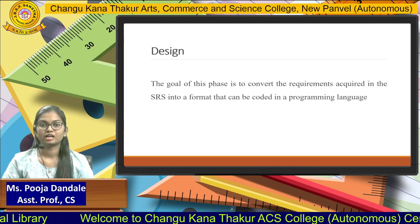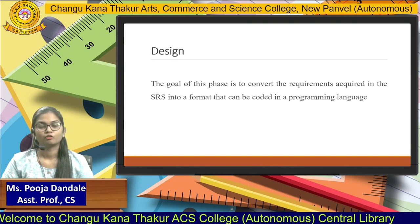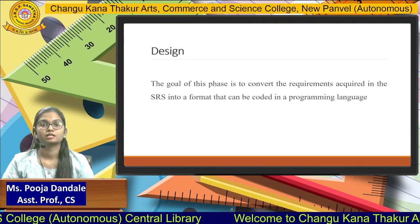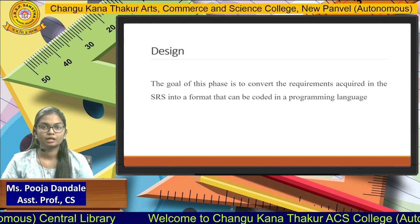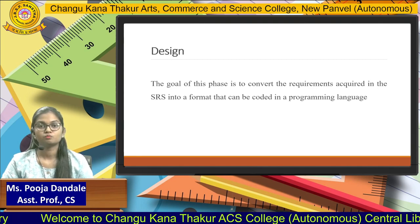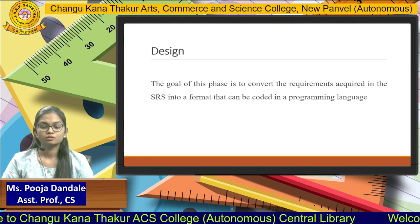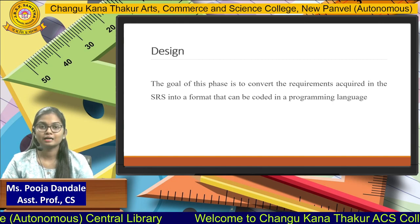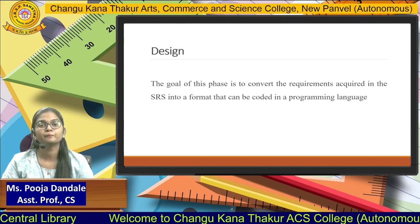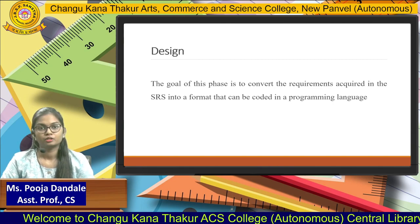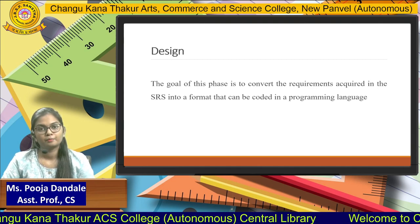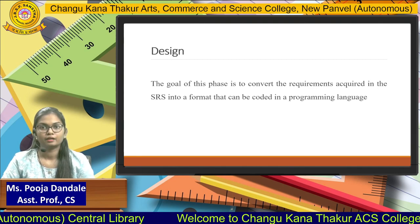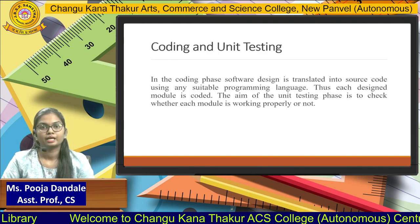Once we have done our feasibility study and gathered all the specific requirements, we design all the modules. For example, we will have a login page, a registration page, and after login we end up on the home page — we design all these modules. The goal of this phase is to convert the requirements from the SRS (Software Requirement Specification) document into a format that can be coded in a programming language.